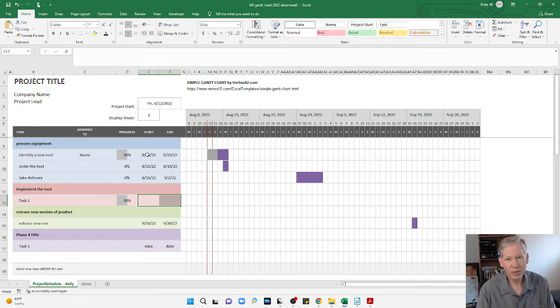So when you're doing the project plan, don't rely on this automation they have in here of starting the next task at the very end of the previous one. Go through and think about each task on your own, even if you know that there's dependencies. A lot of times you can start with the following task before the first one's completely finished.